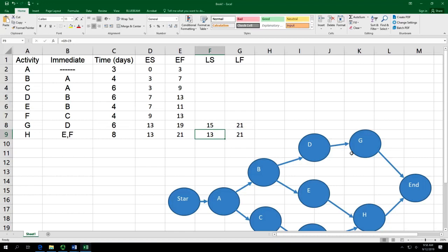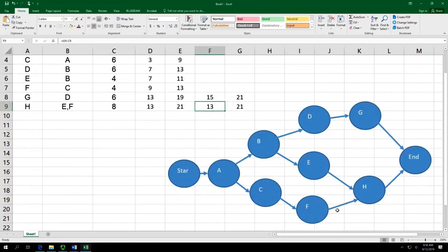Now I'm starting to work with F. F is connected with H. This is start, and this start equals this finish. So F's finish equals H's start, so it equals 30, because these two, F and H, right?